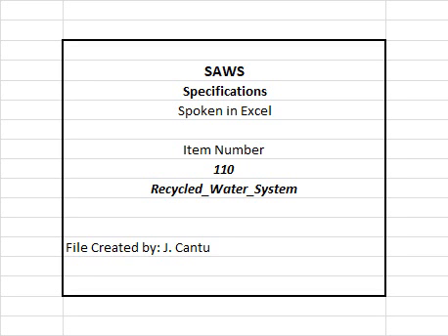1. Certifications. A. Per General Conditions Section 5.12.2, all contractor submittals for all pipe and other products or materials furnished under this specification shall be marked as reviewed and approved by contractor for compliance with contract documents and the reference standards. B. The manufacturer shall provide an ISO 9001 certificate by a third party. C. Submit written verification that the pipe manufacturer has been manufacturing pipe per required ASTM with similar design pressure and size as this project.